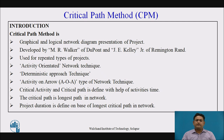It is a deterministic approach because, as it is used for the repeated type of projects, deterministic times are derived. The critical activities and the critical activity path are derived with the activity times. The critical path is the longest path in the network diagram, which helps us derive the overall project duration. If there is more than one critical path, the longest path is used to define the project duration.